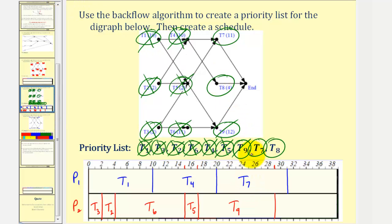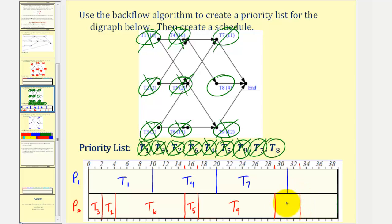Task seven is now in progress. At time twenty-nine hours, task nine is complete. The only unassigned task that's also ready is task eight, and therefore task eight is assigned to processor two. Task eight takes four hours, so twenty-nine plus four is thirty-three. Now that all the tasks have been assigned, the schedule is complete. At thirty-one hours, task seven becomes complete. After thirty-three hours, task eight is complete, and the project is done.